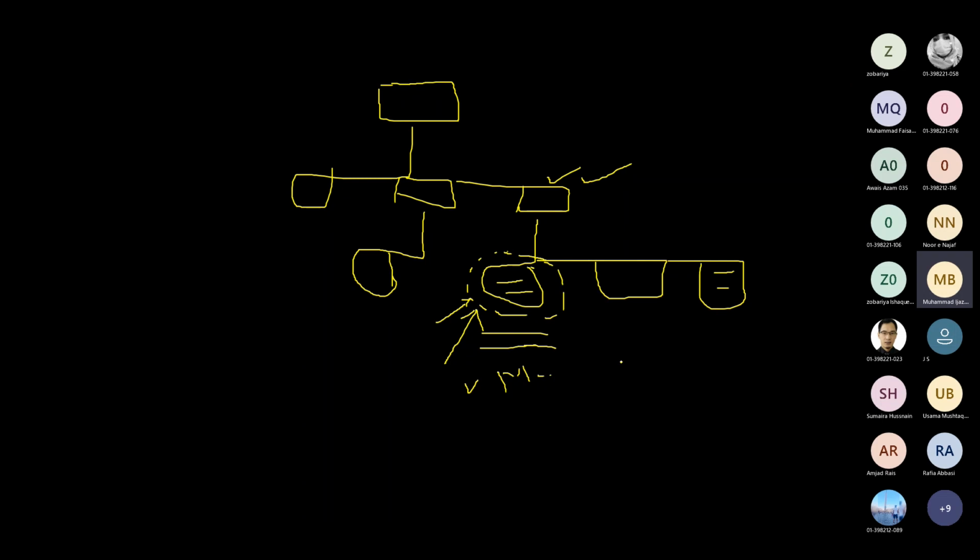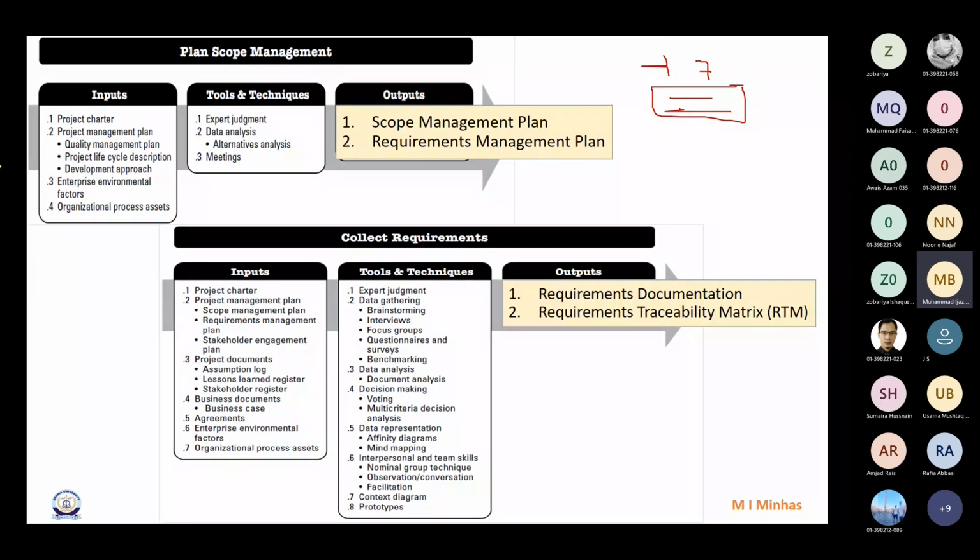Based on the experience of previous project managers, they have developed a general rule of thumb that for smaller projects, a work package should be between 4 to 40 hours. I guess this is good enough, right? So this is just a guideline. Is it clear? Yes, sir.